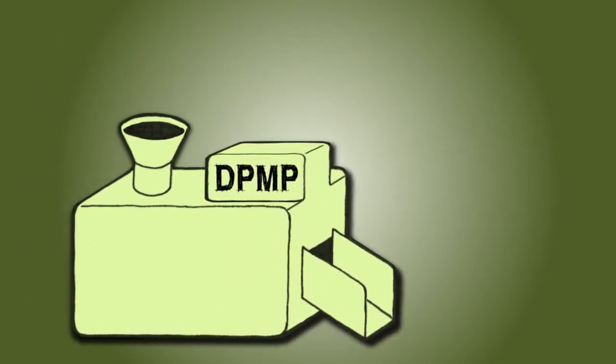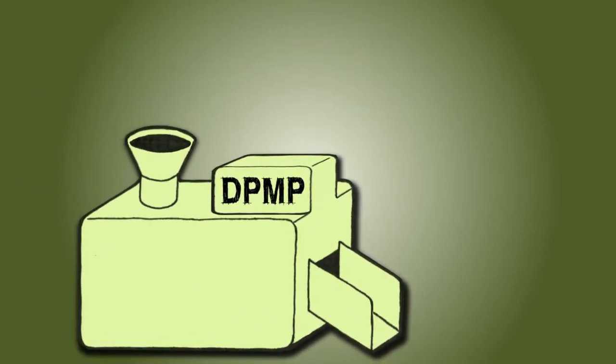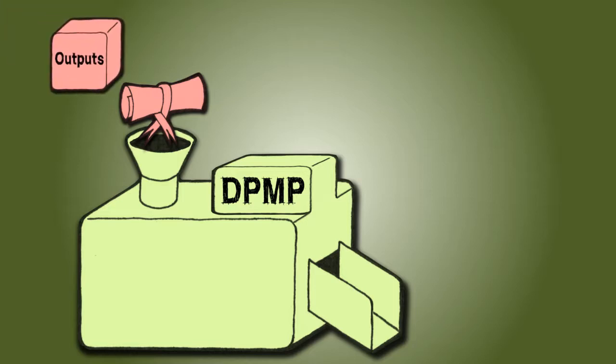The inputs into the Develop Project Management Plan process are the project charter. The high-level view of the project charter will help the project manager break down the big picture into the tasks needed to complete the project's objectives. Many of the 47 project management processes will develop their own subsidiary plans, schedules, budgets, and requirements. These outputs from the other processes are the nuts and bolts of the project management plan and help to build the plan into an achievable effort for the organization.